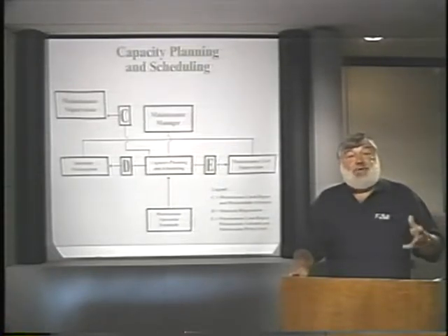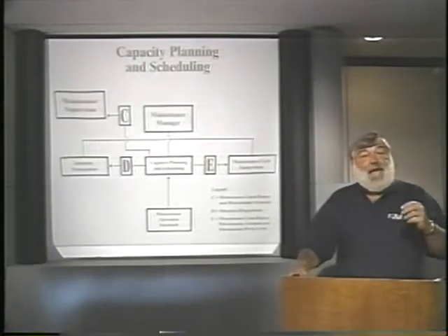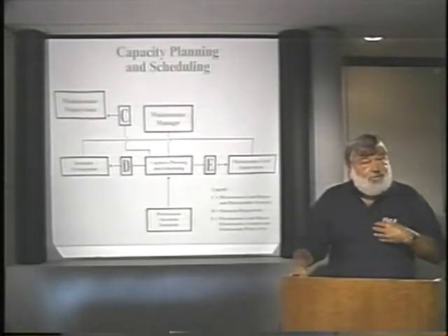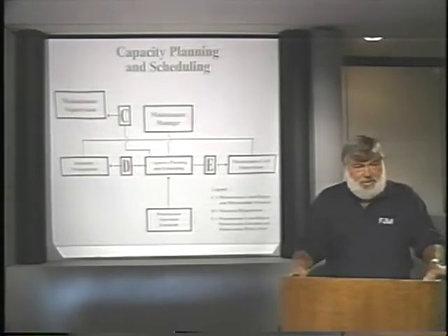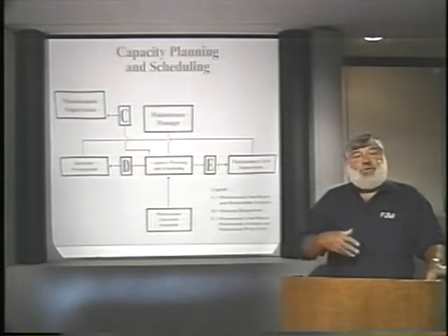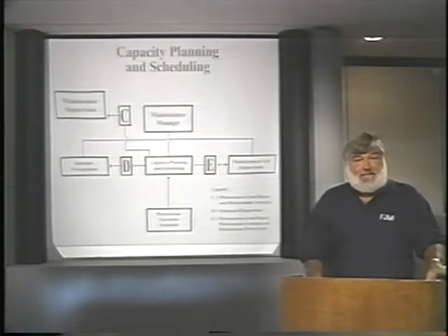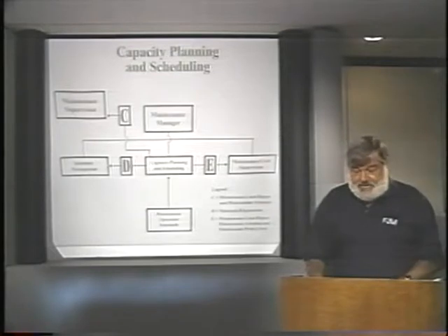Other standards would be developed relative to the first step or the first operation or sequence on a PM work order. We call that preparation time, and that is the time to get the necessary spare parts, tools, equipment, and documentation from the crib. So you can see that you have the ability to develop the standards, and those can be utilized, as I said, by other PM activities for other assets.